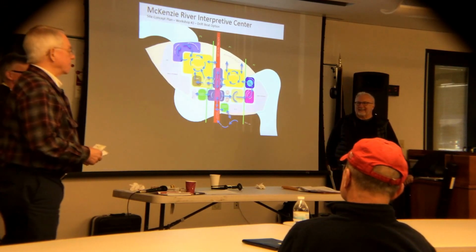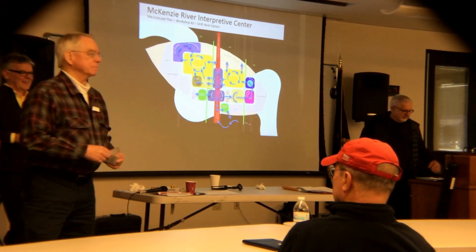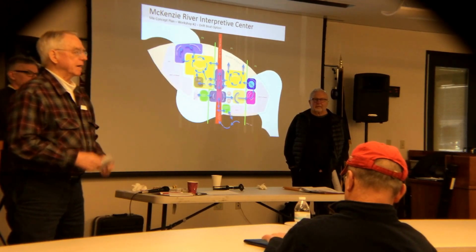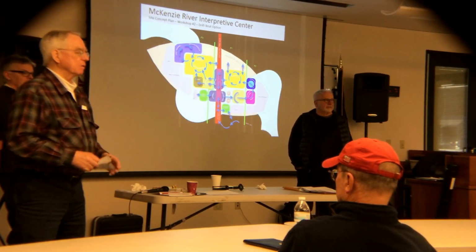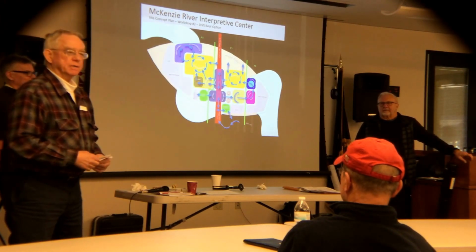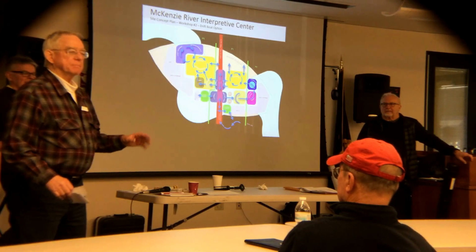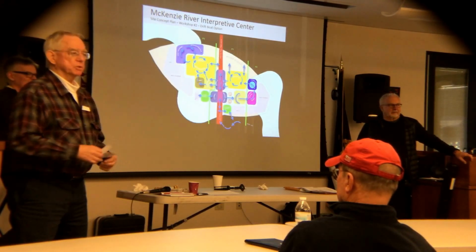The questions are right on the money, and the money's not here. But we have a plan, and we've consulted with Casey Woodard and Eric McCready, professional fundraisers with years and years of experience. We know that in professional fundraising, you're going to have to spend 20 to 25% of what you're going to raise on fundraising. We have been told, and we believe, that once we have this presentation to present to the Lane County Commissioners and convince them to give us a 99-year lease for nothing, that will let us go out and raise money. Once we start fundraising, we've been advised that you don't want to ask anybody for money until a donor steps up with $500,000 to fund your initial cost estimate. That's a big number, but we will never get there without big contributions. This is where it started.